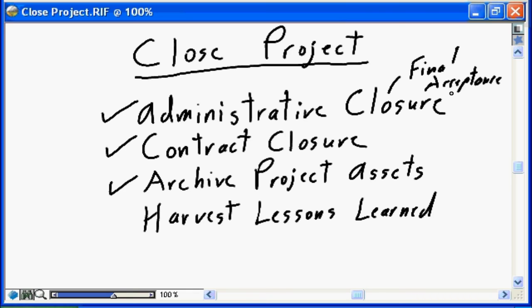A lot of work has been done into producing the final product and getting the final acceptance, and that work all resulted in project artifacts, project assets. As part of proper project closure, these artifacts, these assets should be archived, put into some kind of, I'm going to use the word permanent storage, that is going to allow future projects,